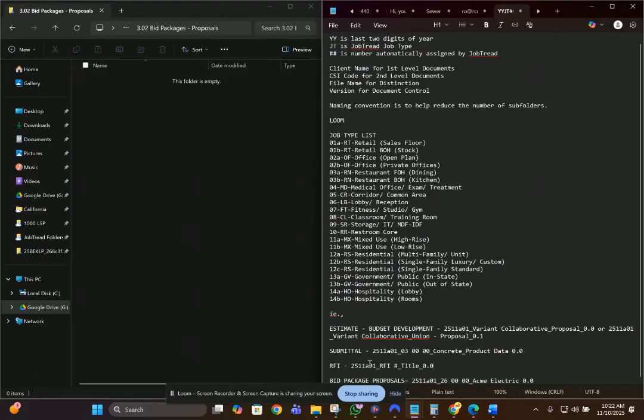If you're using software and you upload that stuff, it's always good to at least attach the job number and the RFI number to any of the documents that you're uploading so that they're easy to find later, especially if you're not adopting this naming convention on your drive and the software in both places, because that is a duplication of efforts.